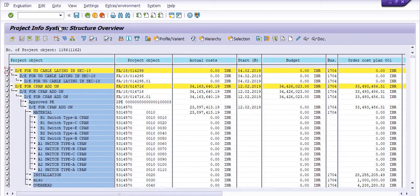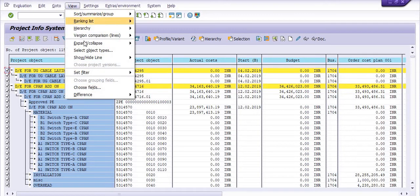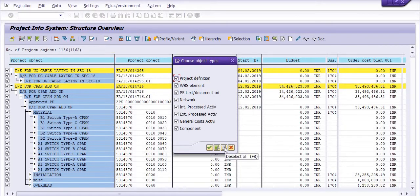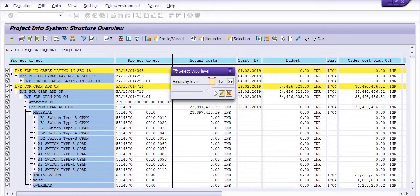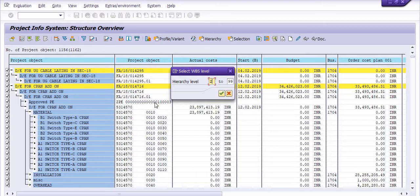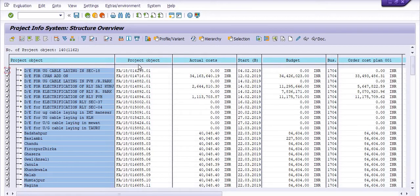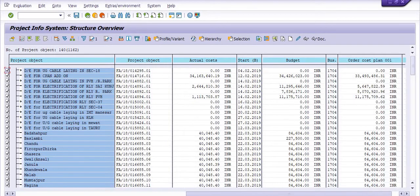To be more precise to select the criteria of the WBS, go to the view object, go to select object types, and deselect all. Click on the WBS element and choose the hierarchy level 2 to 99, because we made the WBS from level 2 of the project definition. Level 1 is a project definition and level 2 to 99 is a WBS. Click on it.